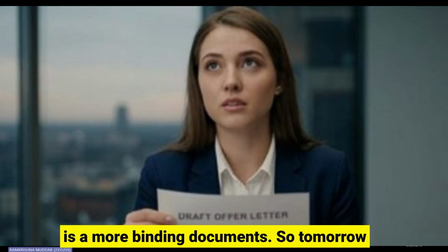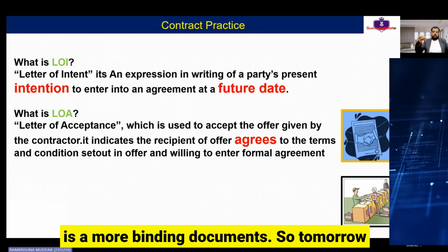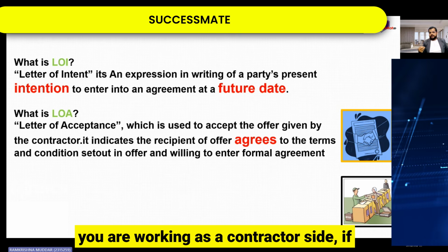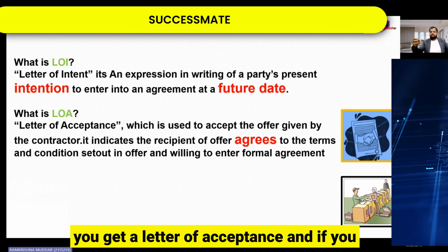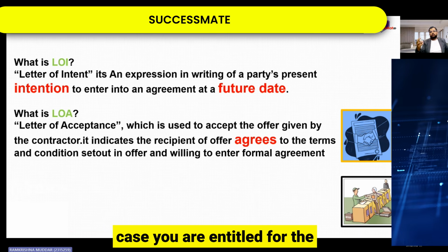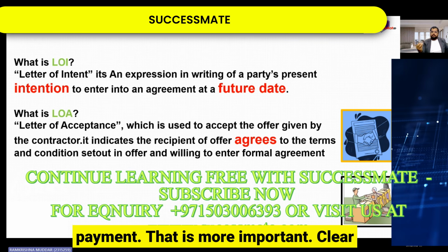A letter of acceptance is a more binding document. So tomorrow, if you get a letter of acceptance when you are working on the contractor side, and you start the work, then in that case you are entitled to payment. That is more important. Clear, guys?